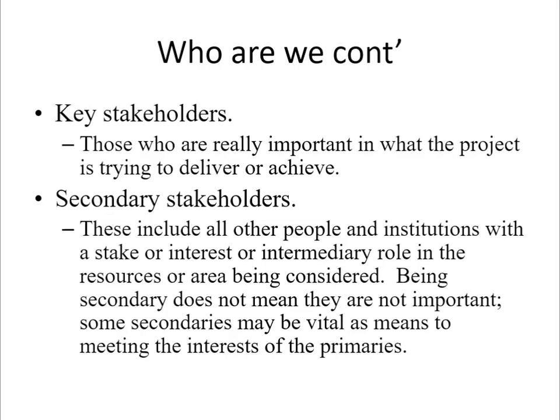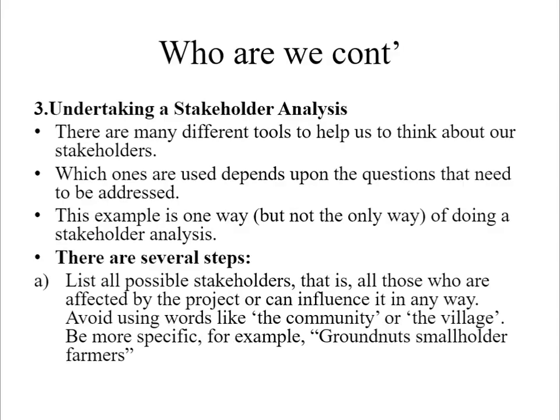Key stakeholders are those who are really important in what the project is trying to deliver or achieve. And secondary stakeholders include other people and institutions with a stake or interest or intermediary role in the resources or area being considered. But being secondary does not mean they are not important stakeholders. Some secondary stakeholders may be vital as means to meeting the interests of the primary stakeholders.